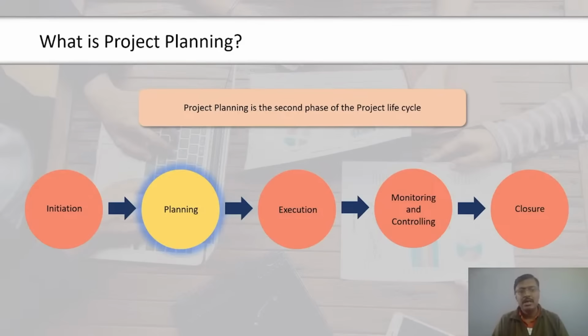Whereas I can construct a wall 1, and meanwhile in parallel I can have a construction of another wall or curing of another wall. But for wall A, the plastering of that wall and curing of that wall, I cannot change the sequence. It should be in sequence only. Whereas in parallel, constructing another wall on the other side and curing that is possible.